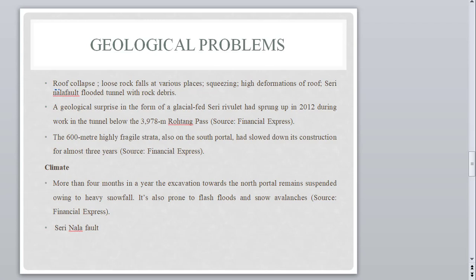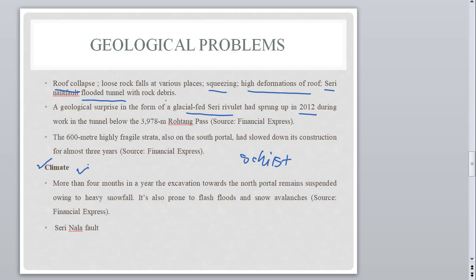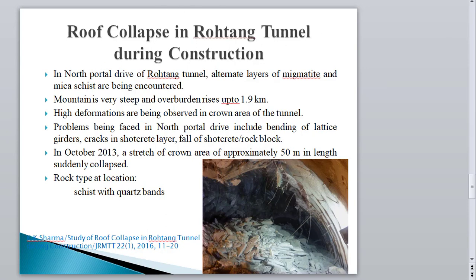The geological problems encountered were: roof collapse with loose rock falls, squeezing conditions, and high deformation of the roof. The Siri Nala flooded the tunnel with rock debris. A major geological surprise was the glacial flat at Siri Nala in 2012. Highly fragile strata in the form of schist with alternating quartz bands caused significant over-breaking problems. Additionally, climatic conditions due to heavy snowfall halted work every year for four months.